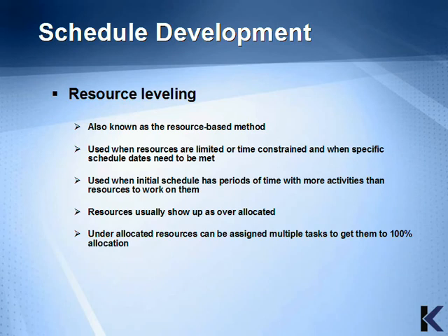In this section, we'll continue the review of tools and techniques for schedule development. The next technique is called resource leveling. This is also known as the resource-based method. It's used when resources are limited or time-constrained and when specific schedule dates need to be met. It's used also when initial schedules have periods of time with more activities than resources to work on them.